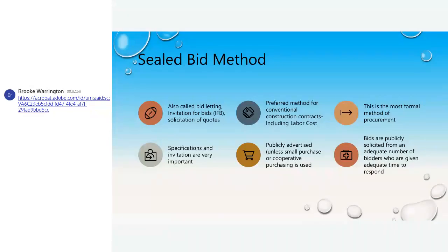It is the most formal method of procurement that you will use. They're publicly solicited from an adequate number of bidders who are given adequate time to respond. Remember what I said? The more complex it is, the longer you give them. Those guys will come in with a sealed bid.